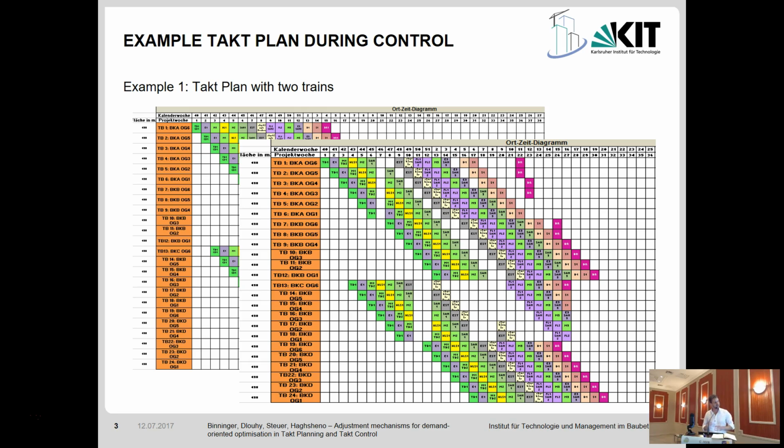And what we did in this paper, we looked at these tech plans and tried to figure out what are the repetitive types of actions which we have done. For example, you can see sometimes this vertical line where we really stop the production. You can see simple or single boxes where we just filled in and put the train out, just divided the train, or you see just some single gaps.